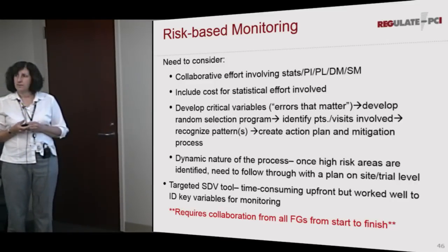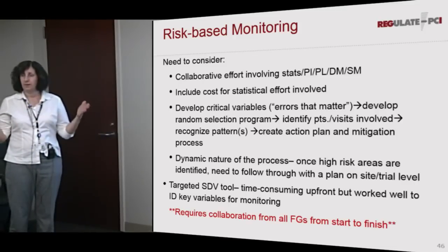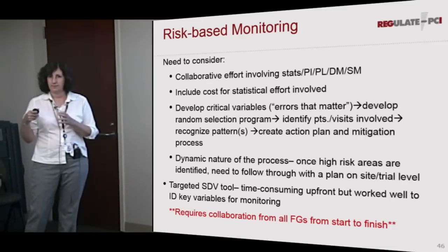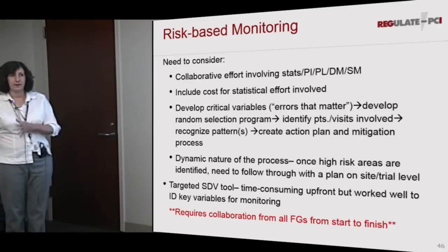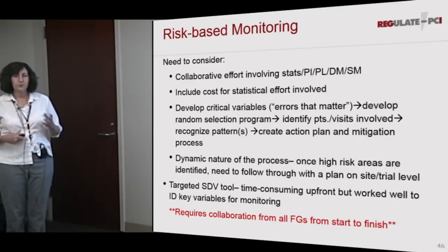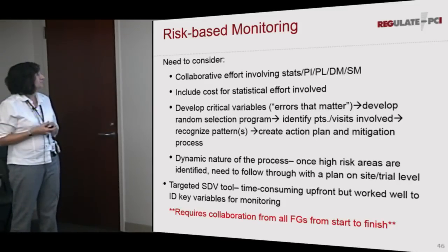And I think when sponsors hear risk-based monitoring, they think, oh good, we were planning to do 1,000 visits and now we're only going to do 500, so we're going to save all that money. But you need to also remember that there's statistical effort that has to go into that too. If you're not going to be out at sites, you need somebody who's going to program the reports that can look for patterns and things like that, so that those visits don't have to be done on site.